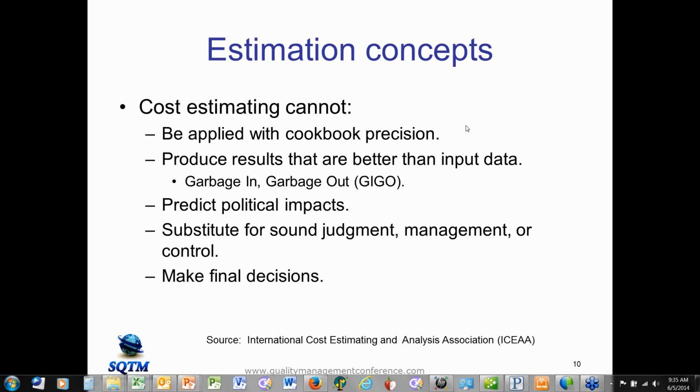There are 2 different approaches. One gets you pretty close, and the mathematically correct approach is hard to do without a whiteboard, but I'll explain it briefly. You convert all of your data to log space, so you take the log of all the data elements and the result elements.